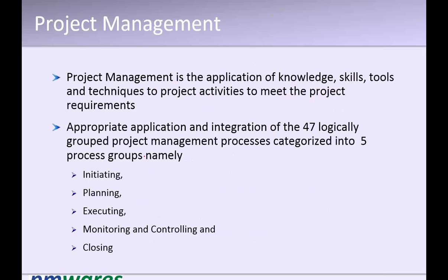He didn't identify those gaps and therefore didn't do anything to fill them. He could have provided support of a more senior person, or thought of some more expert person, or support from an expert. He would have provided training if these two were not available. There are many options to fill the gaps. Or if nothing can be done, then at least you identify this as a risk.